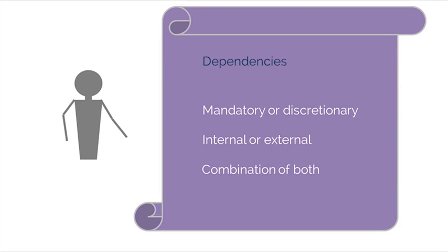In a project, the project team will need to determine which dependencies are mandatory during the process of sequencing the activities. Discretionary dependencies, often referred to as preferred logic, preferential logic, or soft logic, are typically due to industry best practices or a desired sequence. For example, you decide that it is best to make door and window frames before the full structure of the wall is in place.